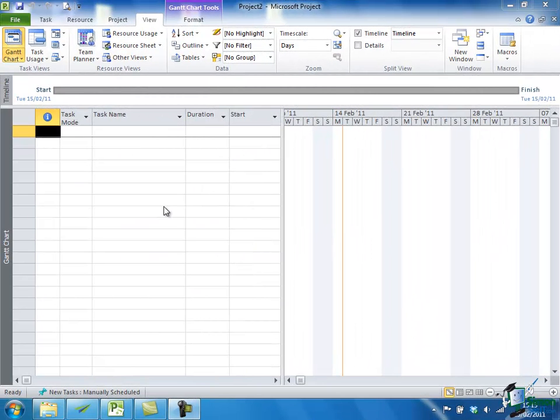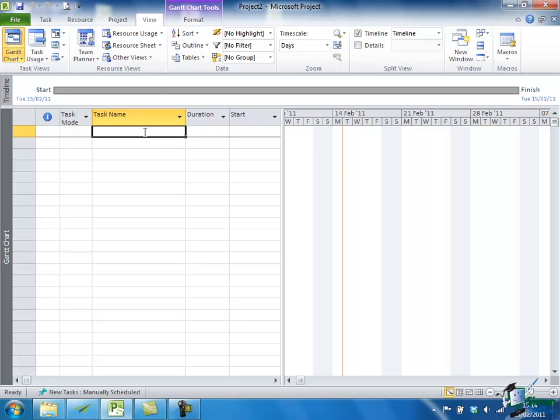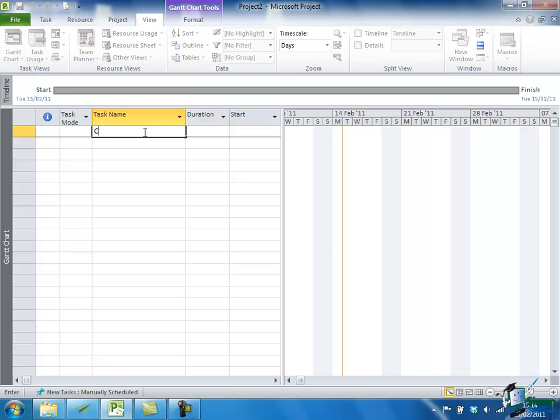Now when it comes to actually creating the project, nothing could be simpler really. I finish up with the Gantt chart as my default view, chart on the right. There's nothing in it at the moment, but I start putting my tasks in. Interestingly, you don't actually have to put these in the order you intend to execute them, but it does make life a lot easier later on. So let's do it pretty much in the order that I said just now. The first task was to clear the site. So I click in that box, it gets highlighted, and I'm just going to type Clear Site.